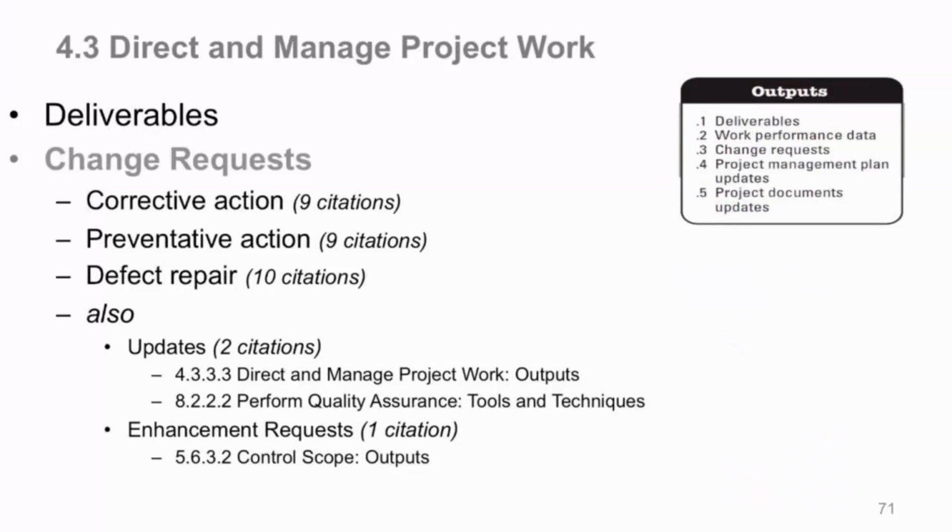Depending on what the question is, I'm sure they won't say 3, 4, or 5, but they may ask, is an enhancement a valid change request? Well, the answer would be yes, according to the PMBOK. So just keep in mind that there are these 5 types mentioned throughout the PMBOK, but certainly the core primary ones are corrective action, preventive action, and defect repair.